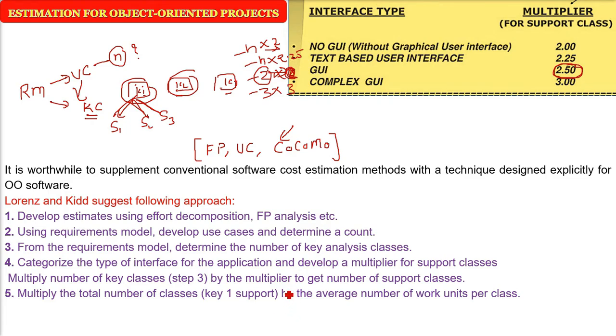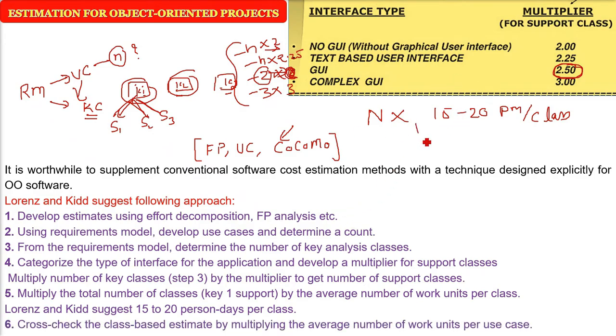Once the total number of classes is known, multiply by the average number of work units per class. Lorenz and Kidd suggest 15 to 20 person-days per class. Multiply the total classes by any number between 15 to 20 that seems appropriate for your particular project.